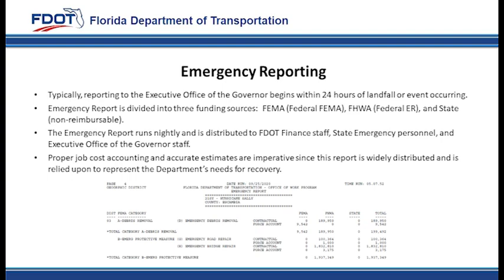As more information becomes available, estimates should be updated to reflect the most recent information. All unused or non-applicable phases should be dropped no later than 30 calendar days after the event occurs. Central office will identify and drop phases showing no activity after 45 days to reduce the number of placeholder estimates.